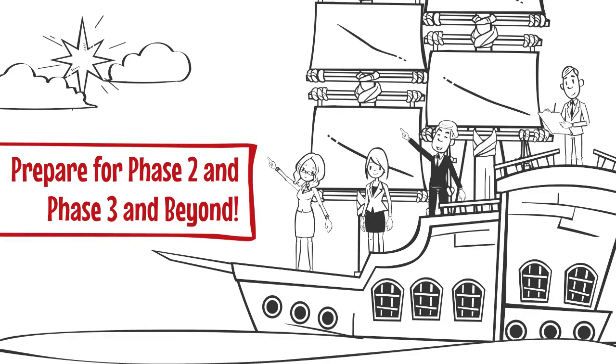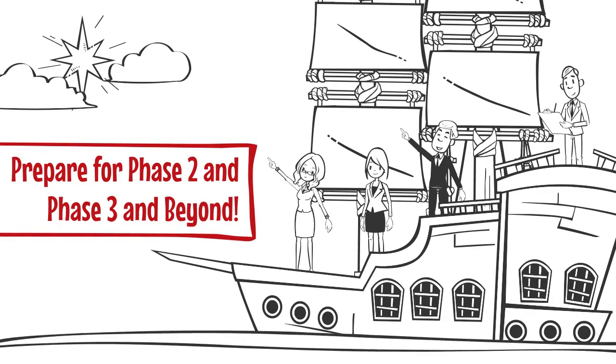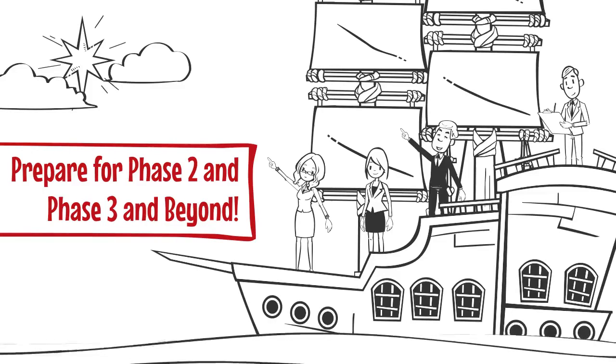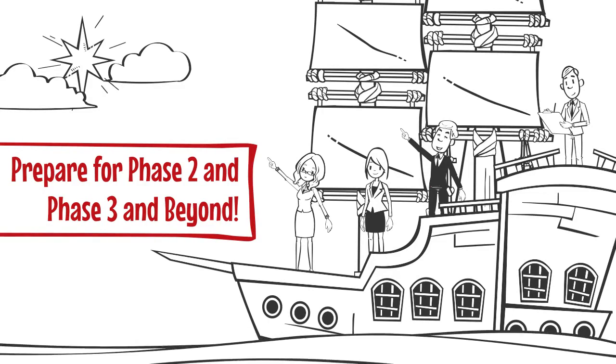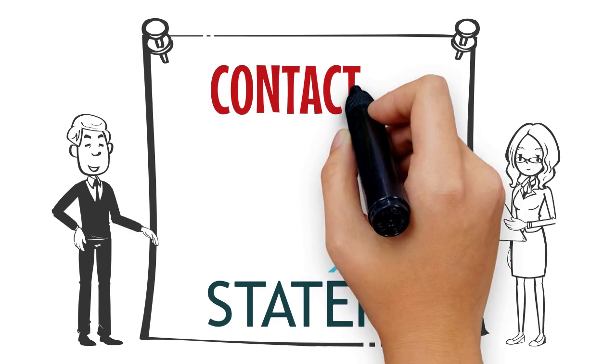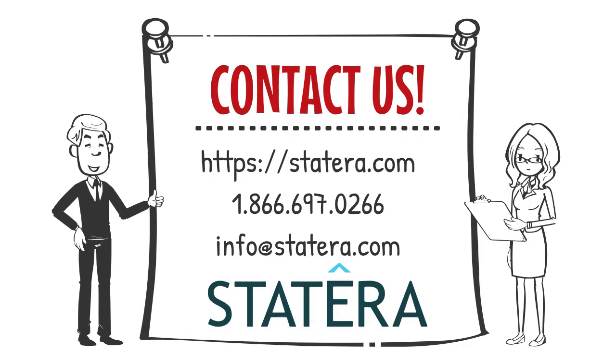Don't try to fit every single one of your requirements and use cases into the first implementation. Prioritize them and allow the ones that fall off on the first implementation to evolve for Phase 2 and Phase 3 and beyond. Like I mentioned in Installment 2 of the series, you're not alone on this journey of preparing to onboard consultants.